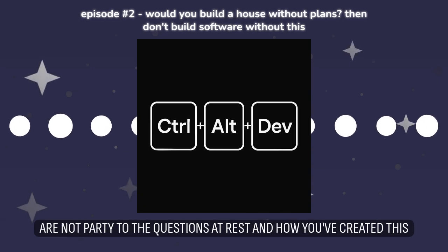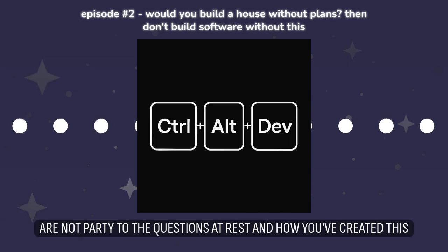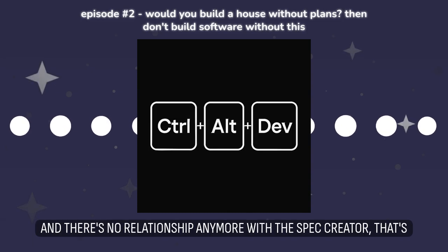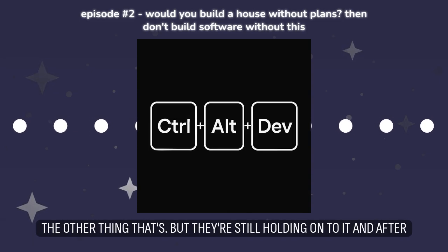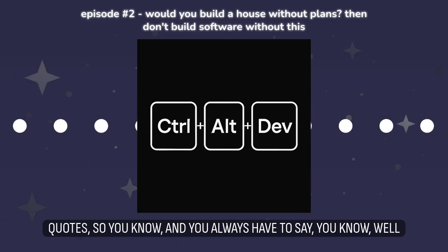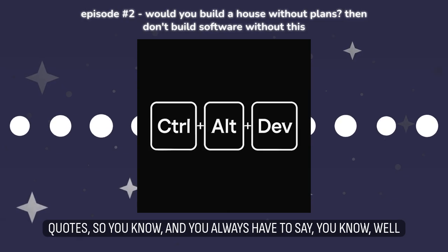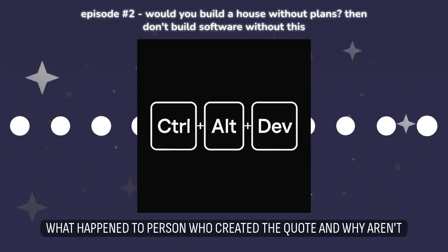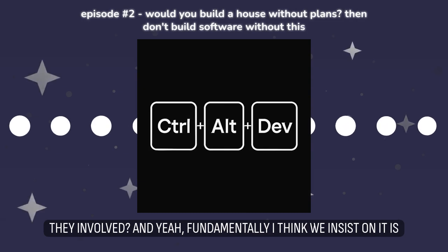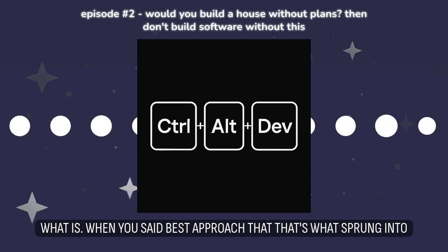But we are not party to the questions that were asked and how it was created, and there's no relationship anymore with the spec creator, yet they're still holding on to it and after quotes. You always have to ask, what happened to the person who created the spec and why aren't they involved?